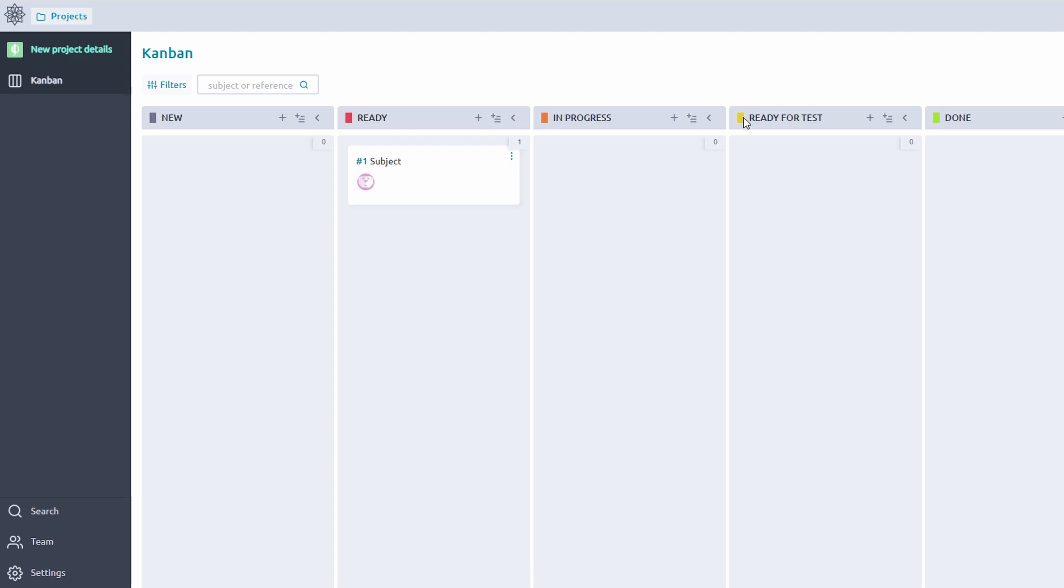For teams using Kanban, Taiga's visual boards provide an intuitive way to manage tasks and ensure a smooth workflow. Tailor the columns to reflect your unique process. For instance, you can create stages like Backlog, Design, Development, Review, and Completed. Adjust these as your team's needs evolve.